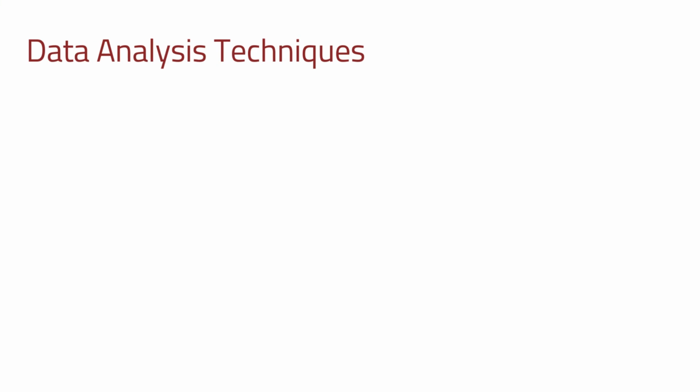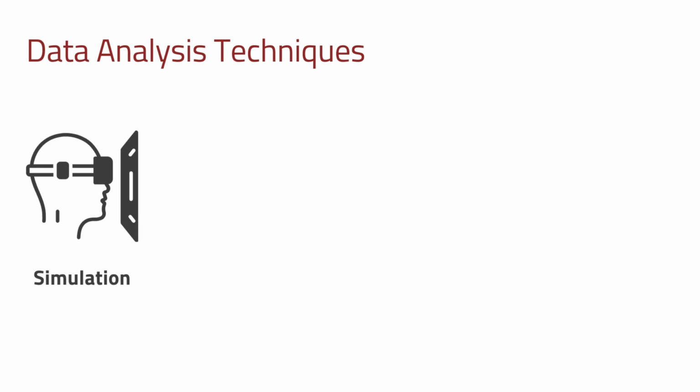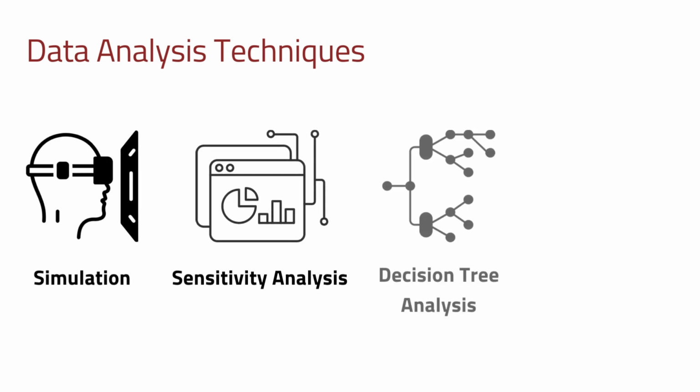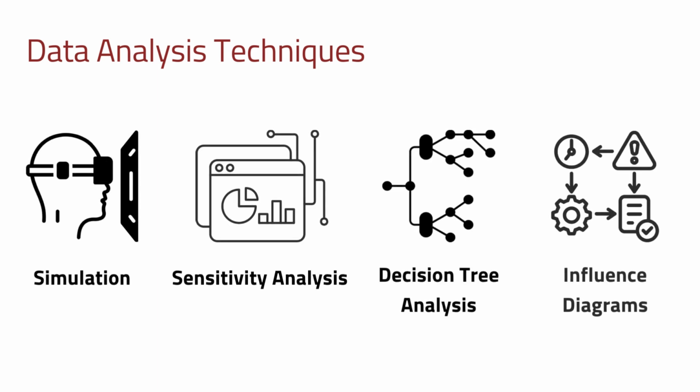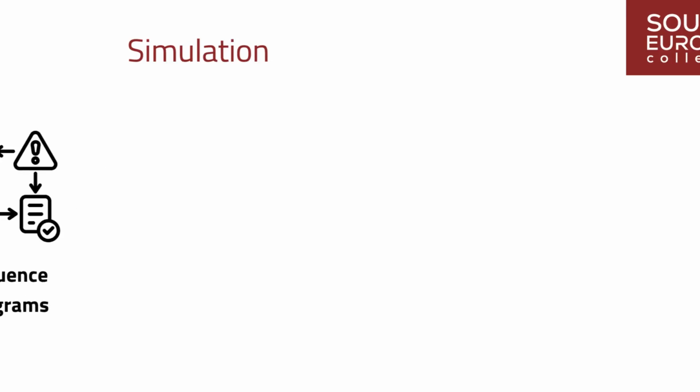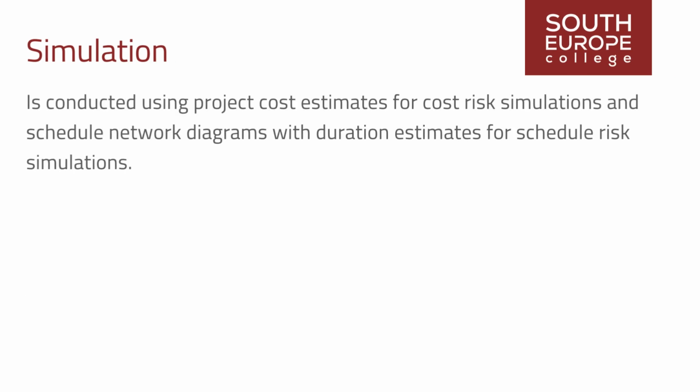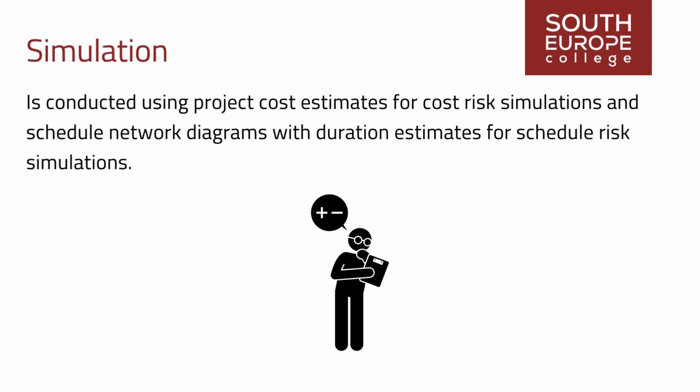Data analysis techniques applicable during this process encompass simulation, sensitivity analysis, decision tree analysis, and influence diagrams. Simulation is conducted using project cost estimates for cost risk simulations and schedule network diagrams with duration estimates for schedule risk simulations.